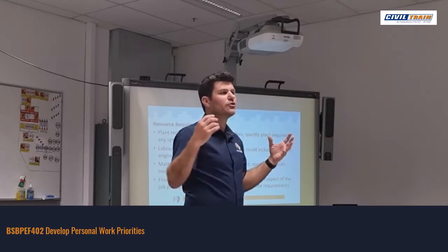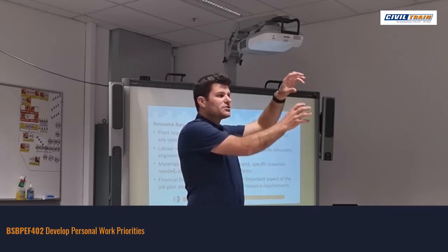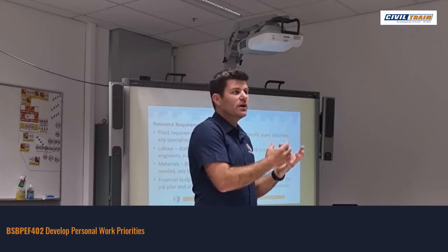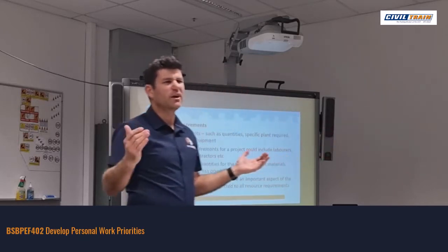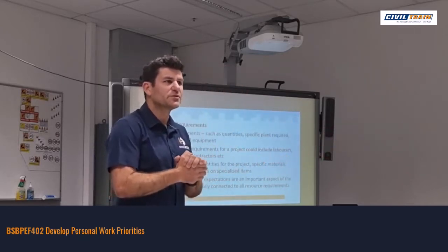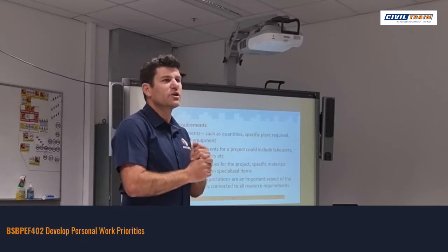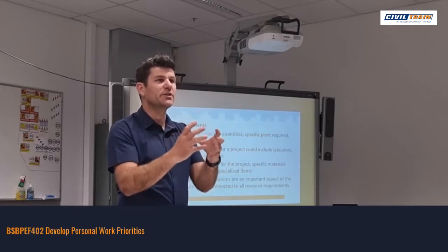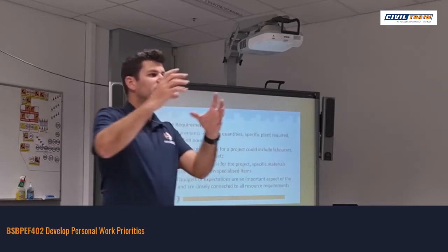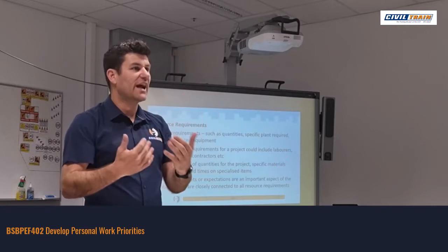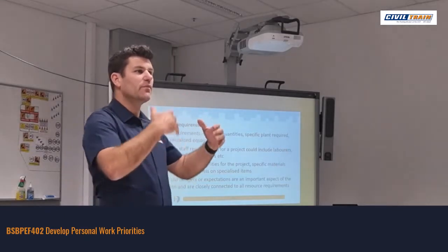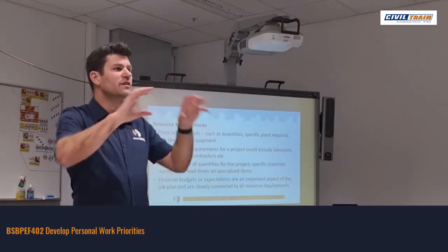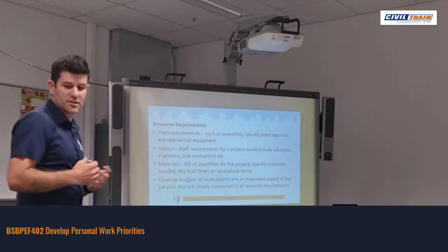But it's a lot of human resources to do that. If I was to spread those activities out, I could potentially use fewer people, but still complete it within the same time frame. So sometimes we talk about being resource dependent and also leveling off, where we try and move activities that don't need to be completed on day 1 to a day where we've got minimal activity happening, so we keep the work crew busy throughout the program, but we actually start moving things around. So we'll be looking at that process as well.